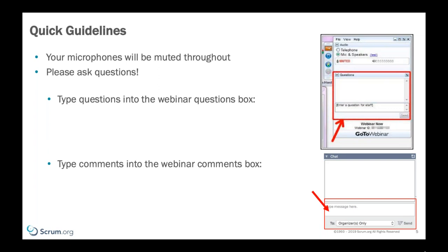And then what's the next most important report you need? And do that and iteratively pull down the data. It will take longer to build the data architecture. You will probably have to do a number of refactors along the way, but you're getting value in front of the users. Not only that, but you're reducing the risk that the organization has.